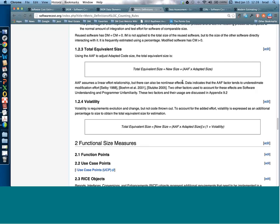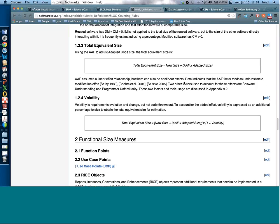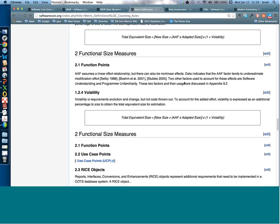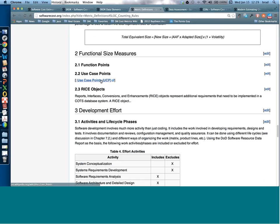If you're using different measures like function points or use case points, there may be parts of the software reused from other applications, which impacts the effort required. The function point factor you develop in a CER may differ for applications reusing components compared to a brand-new application. The functional size measure section has placeholders for function points, use case points, and RICE objects — we'd like to add discussions and pointers to the web for more information on these.